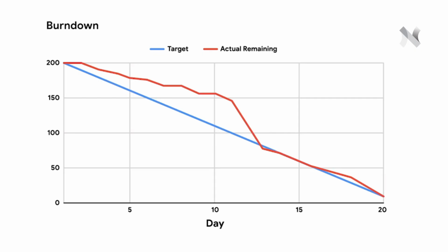Here's an example. Let's imagine our team's sprints are 4 weeks long, which will count as 20 business days. In their July sprint, the sprint backlog had stories that added up to a total of 200 points to be completed. If you assumed an even burn of points over the business days, you'd expect 10 points to be burned each day. By day 5 in their sprint, 22 points had been burned or completed. It's only 25% of their sprint, so maybe things are on track.